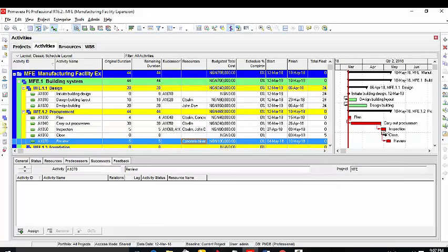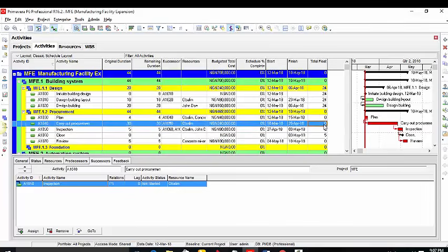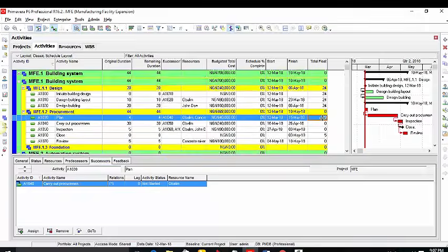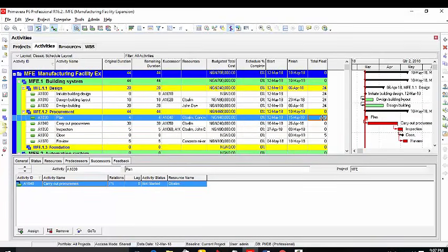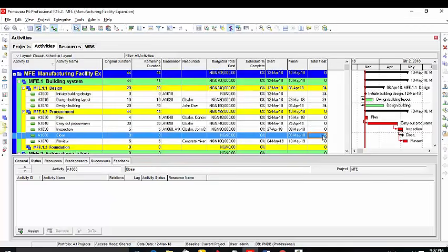So these activities that are actually showing in red are the activities on the critical path. That's why if you look at the total float column, you will notice that the activities on the critical path all have 0 float, because more often than not, activities on the critical path will have a 0 float. In other words, you cannot delay an activity on the critical path because that will affect the project duration. But for the activities on the non-critical path, you can see some of them have 24 days and some of them have, like 5 days float, as the case may be.